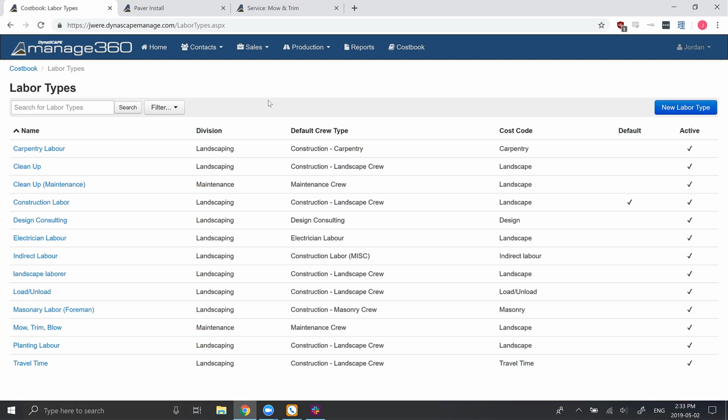They're usually entered to reflect costs associated with things like job site management, and that can be things like trucks, trailers, your permits, portable toilet rental, so actual things, but they can also be supervisor or admin time, cleanup labor, yard time, travel, load and unload, the day-to-day things that you need to do pretty much any job. And so, of course, every job is going to be different. So the way that they're set up in Manage360 is to allow you to set a base list of your normal general conditions and then configure them as you go from job to job.